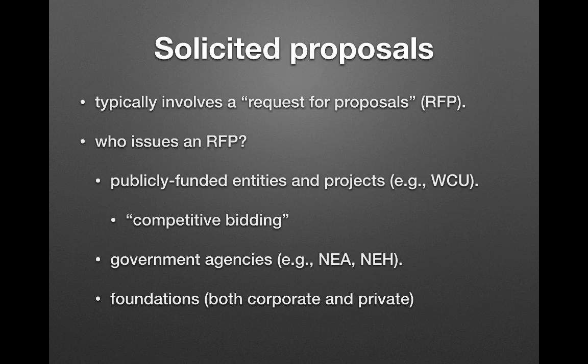Typically the contract goes to the low bidder, because that's responsible use of public funds. Whoever comes in cheapest and is going to do the job, we're going to give them the contract. So there has to be some type of case made to go beyond the low bid. This process is referred to as competitive bidding. So that's one type of an RFP.